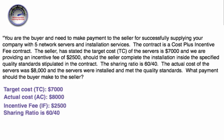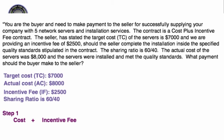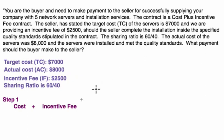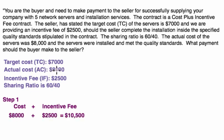Let's do our first calculation. We have one of four calculations to do. Step number one: since this is a cost plus incentive fee contract, we calculate the actual cost plus the incentive fee. The actual cost was $8,000 plus the incentive fee of $2,500, making it $10,500. We'll let that $10,500 sit while we work through the remaining calculations to get the final price.